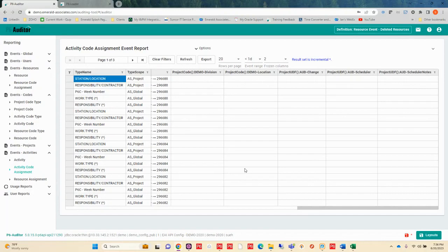And then if you wanted to delete that project, you could go ahead and do that. But you want to restore all your data first before you delete that old project, because that's going to keep that history in there. Once they're gone from the tables, it's not going to find it in Auditor.